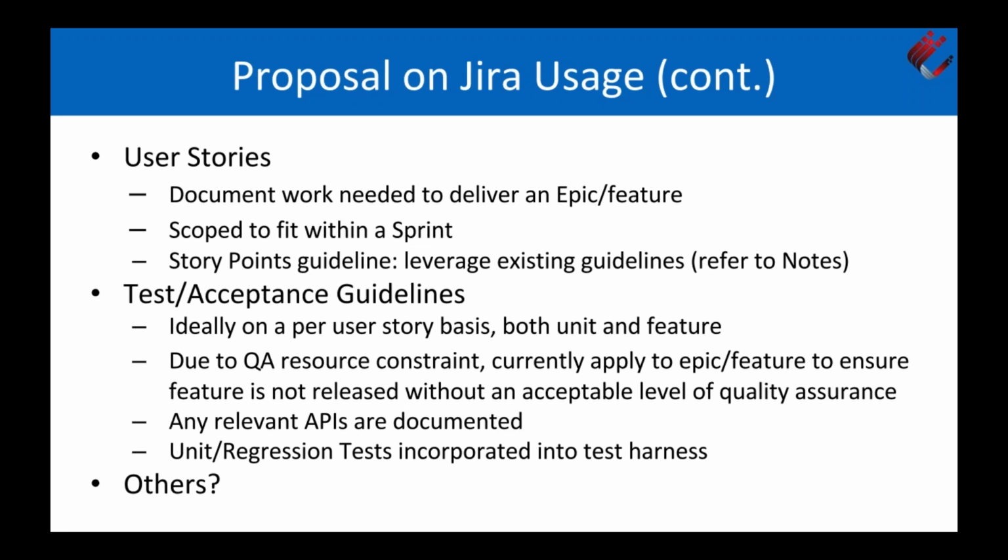Okay. Ideally the user story should be self-contained also, right, in classical Agile. Yes, but I think what we're drawing is a bit of a compromise here. So the user story, in terms of developing the feature, can proceed, but then the overall epic itself needs to be QA'd. So there needs to be a set of tasks or potentially QA-oriented stories to make sure that the quality of that feature is assured.